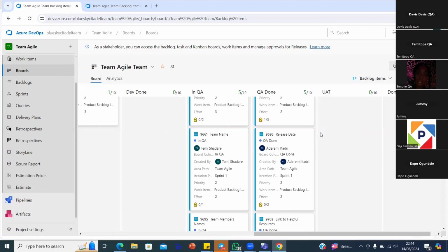Do we change the state of it again to completed? There's a word for it. Okay, yeah. And it's staring at you anyway. It's on this screen. You move it to done. Yeah. So you move it to done. You skip the UAT and you move it to done, because the bug will not be UAT'd, right? So it's only the stories that they will check.